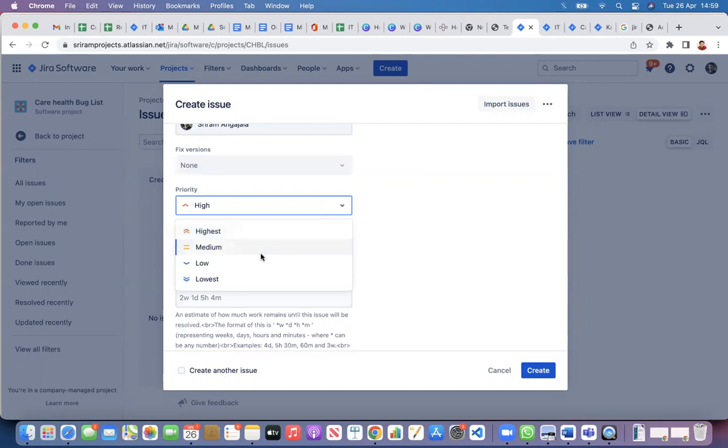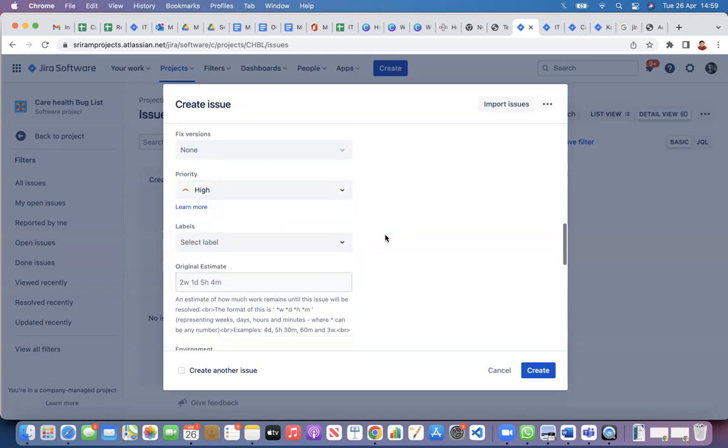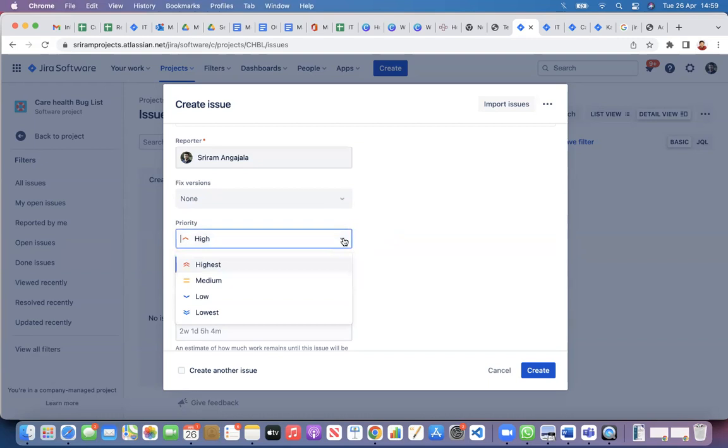We could release. Yes. Can't release. You have to take a decision. If it's a high severity bug, then we cannot. We don't have severity and priority, only priority is there. Now tell me, if I give high or highest, it should be fixed. If I give medium, it can be fixed later. So now this bug, in the context of this bug, is it higher or medium?